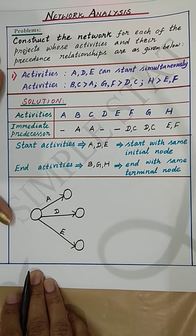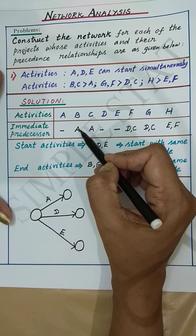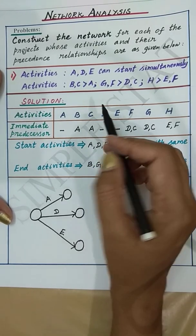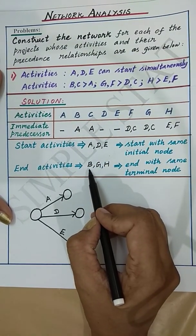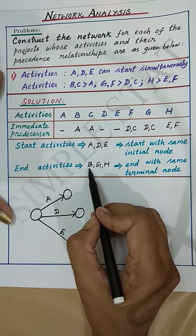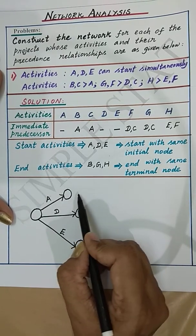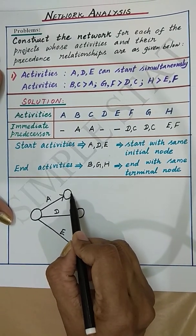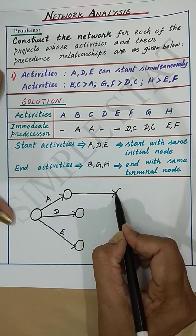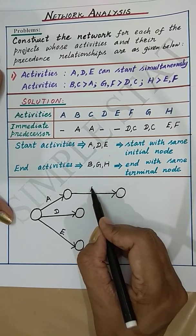Activity B can start after the completion of A, and we know that activity B is also one of the end activities. Let's now draw activity B.